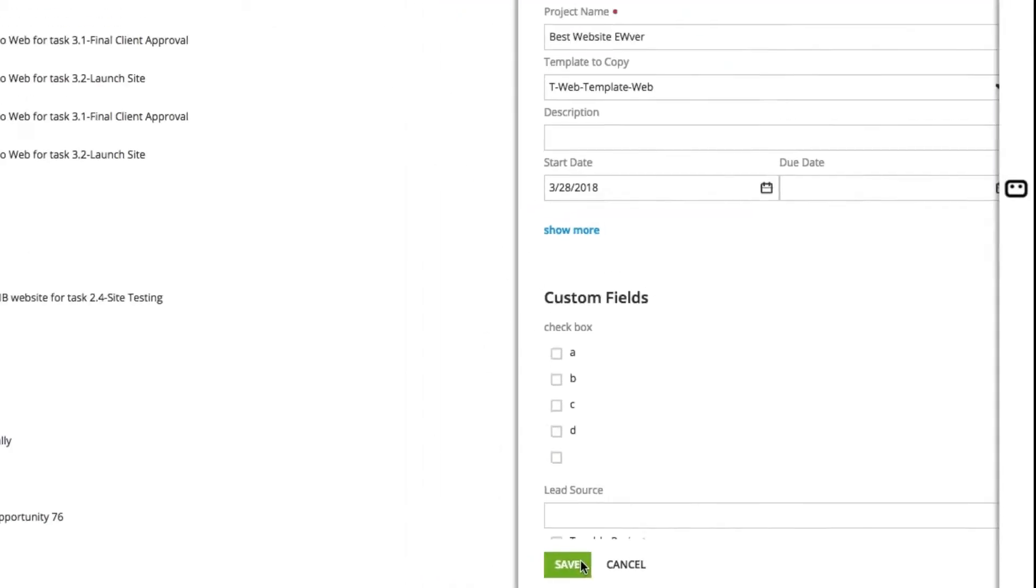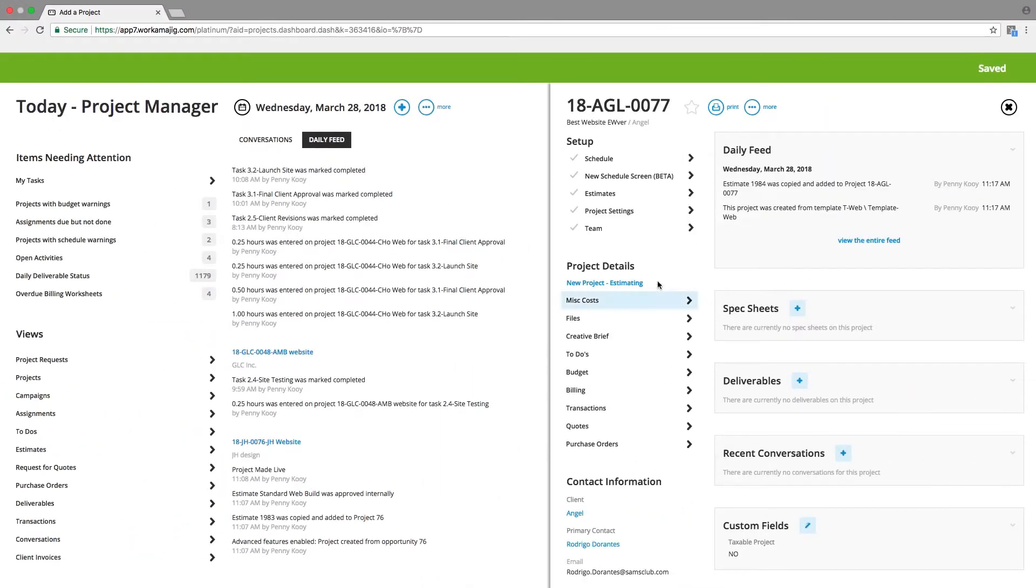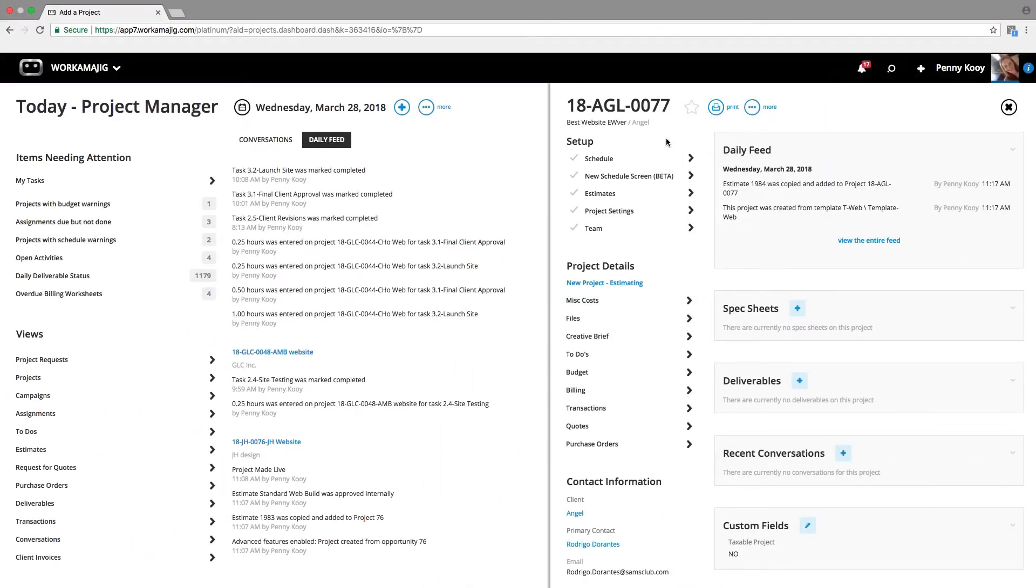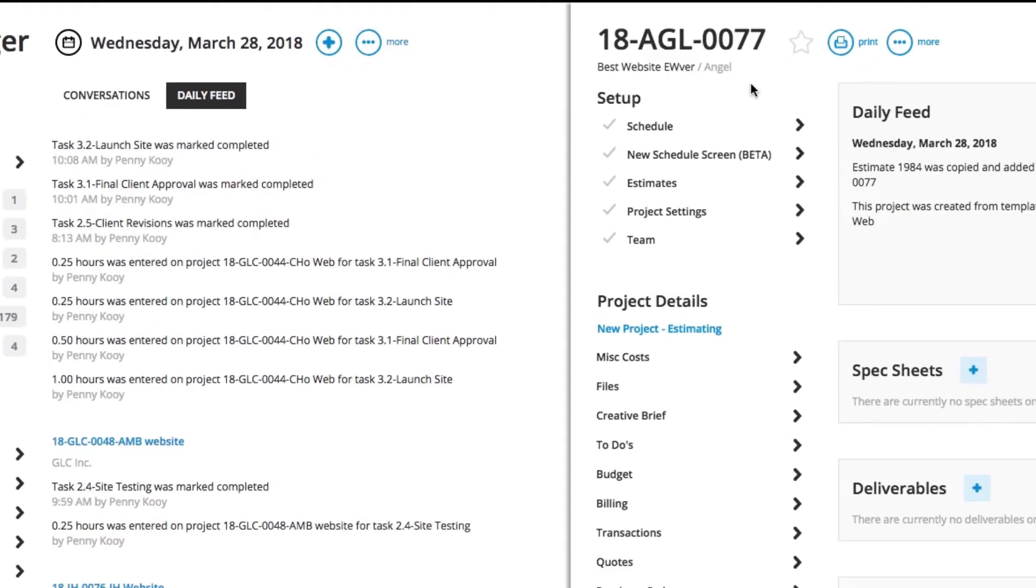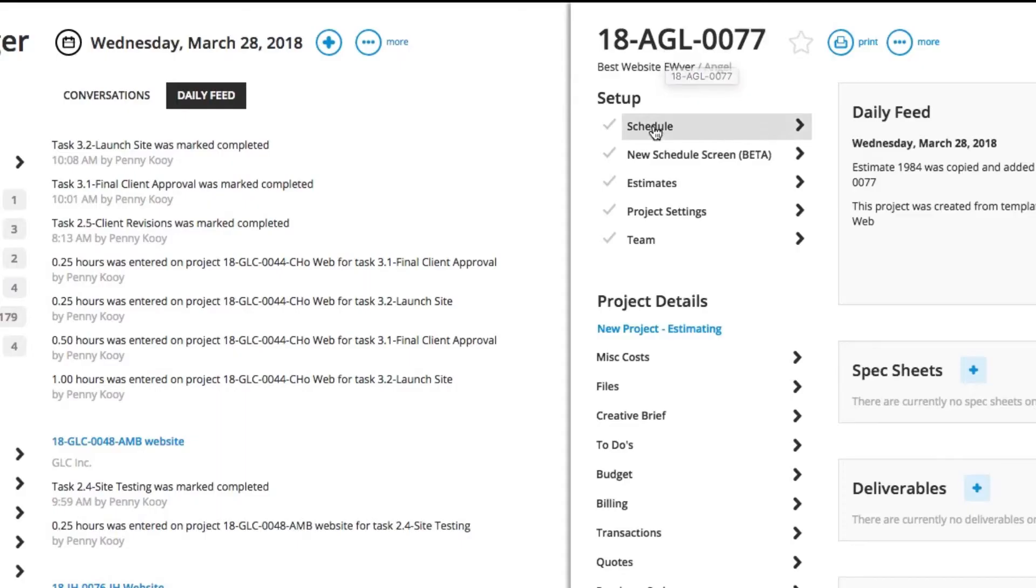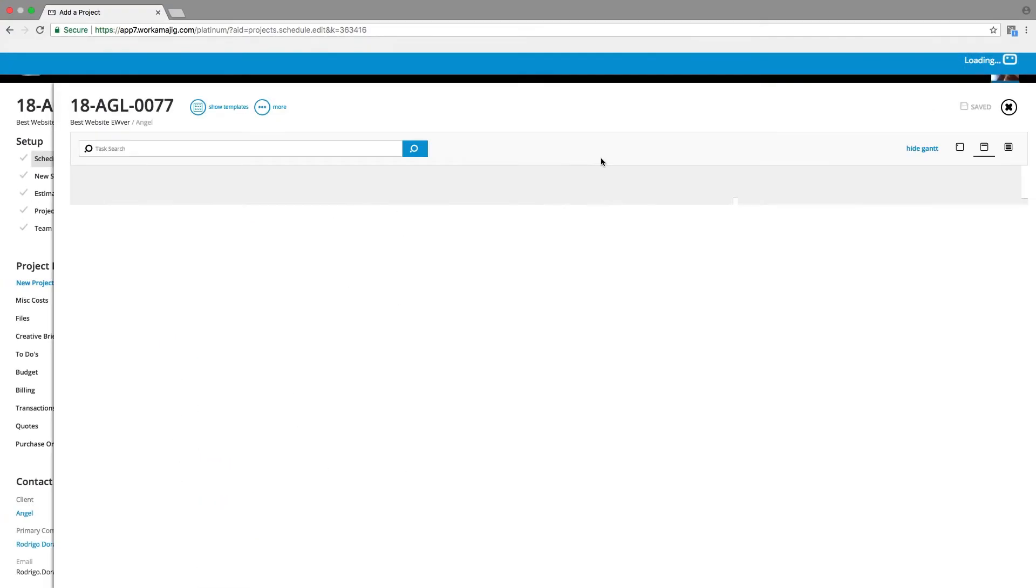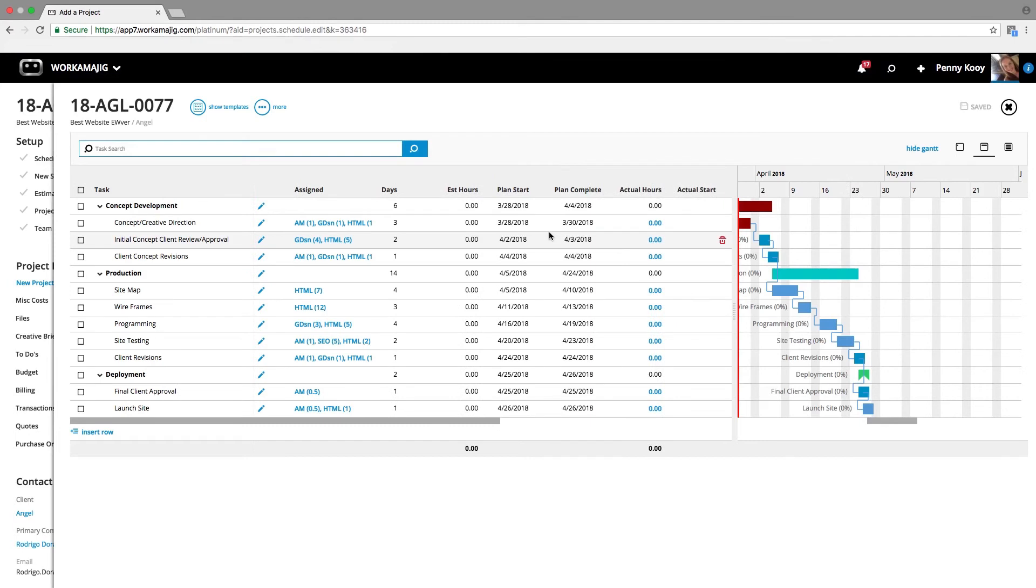A unique project number identifier is automatically assigned, and there's a variety of formulas that you can choose from in Workamajig for that automation. Because of my template selection, I have a schedule ready and waiting for me to make any adjustments based on what's unique to this project to get started.